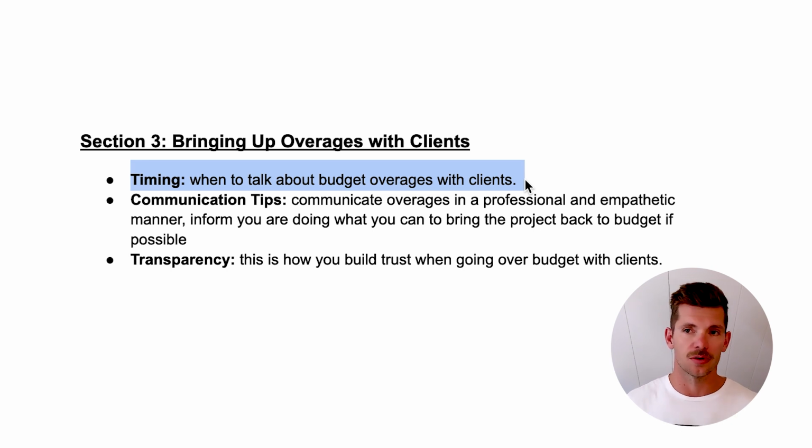Hey, Mr. and Mrs. homeowner, client, whoever it is, listen, while we were in the excavation phase, we found this, we had to do this. Whatever it may be that came up, listen, we had to relocate this thing because it was in the way. We had to do more hand digging because of something we found in the ground. Whatever it is, this is the time to bring it up. Like, listen, we are continuing to work at keeping this number either where it is or being able to lower it by finding other money in the budget. But we want to let you know so that you're not surprised. Here's what we're thinking the overages is from this week. I want to make sure you're okay with that, right? Get that signed off on and then be able to proceed.